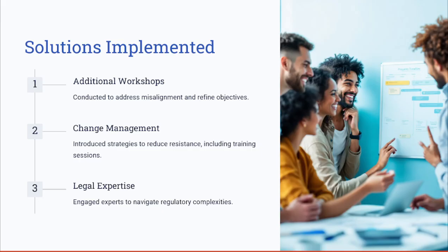What were the solutions that were implemented? To overcome these challenges, the team conducted a targeted workshop to resolve the stakeholder conflicts, ensure alignment, and refine the project objectives. Also, change management strategies such as training sessions and transparent communication helped to address the resistance. Legal experts, as expert judgment, were consulted to ensure compliance with the regional regulations.